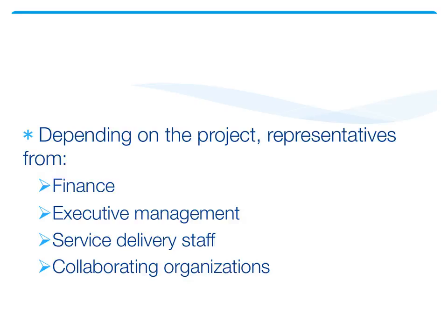Absent those people, if you put together the project plan and they aren't in the room, you might be assuming it takes perhaps 2 people to teach kids how to read, when it might actually take 10 people to teach the audience of children to read that you want to teach. So you need to really keep those people in the loop, the ones that are going to be delivering the services. And then finally, collaborating organizations.